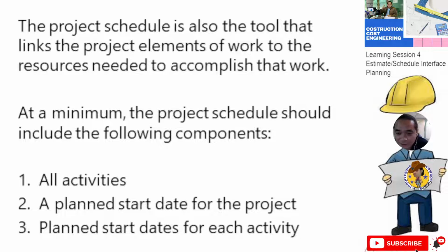Okay, so the project schedule is also the tool that links the project elements of work to the resources needed to accomplish the work. At a minimum, the project schedule should include the following components. Number one, all activities. It is very much needed that you identify all the activities.